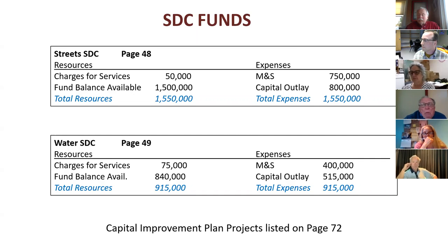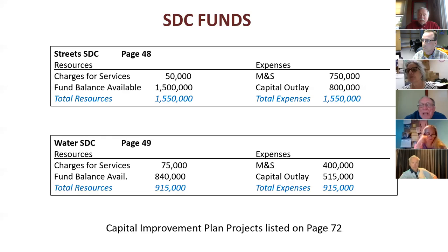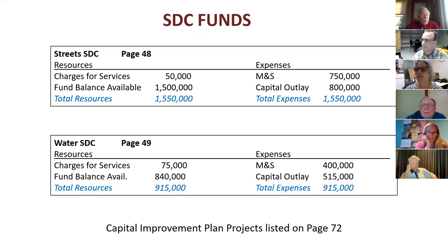I was trying to find out how we account for people's time when they're doing what looks like the same job but under a different umbrella — on private development versus our own. We do have a method to capture some of those costs from the developer, based on the magnitude of the project. On the estimated cost the developer will spend, we charge them a percentage just to get their permit to do the work.